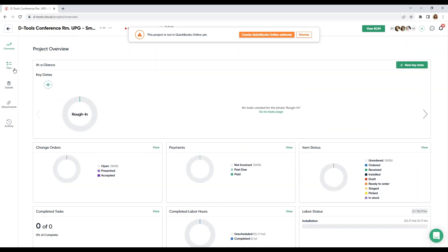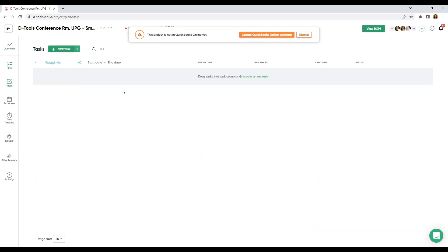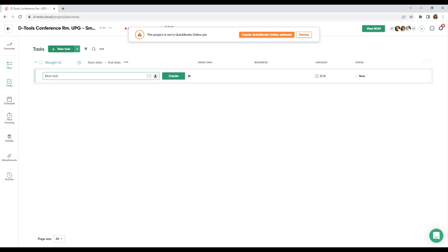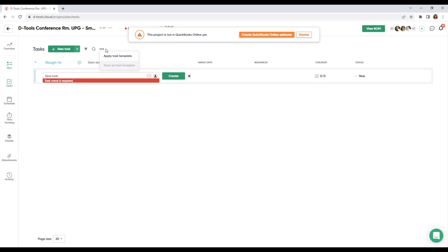Then we're going to jump straight into our project plan. This is your brain dump. What do you want to be done, when, and by whom? Creating tasks is super easy to do. Here are our task groups. Create a task here. It doesn't have to be by the phase. You can do it by location, system, category, whatever you want to do. But if you're doing the same steps for similar projects, here's another tip. Create a task template. Really helps to save time.